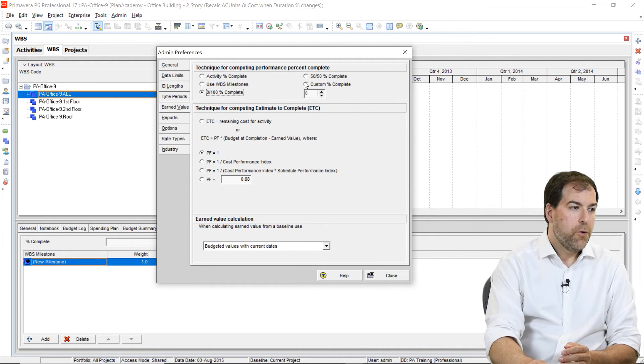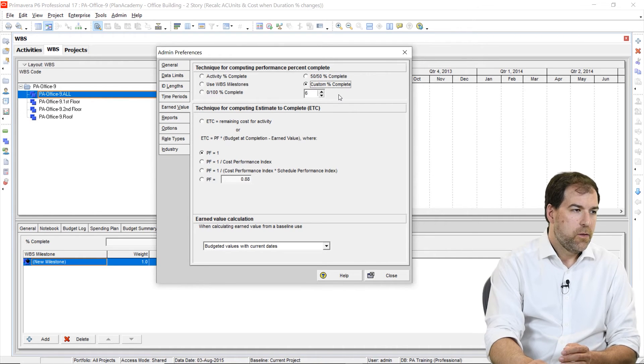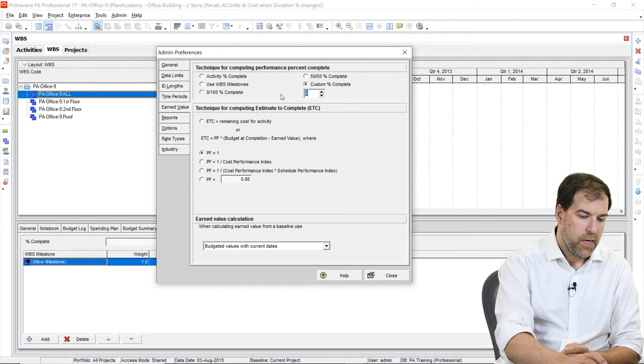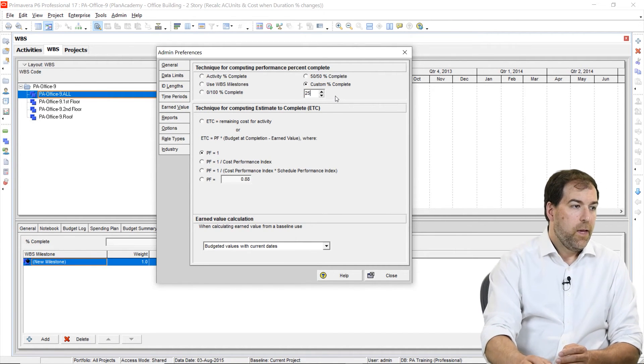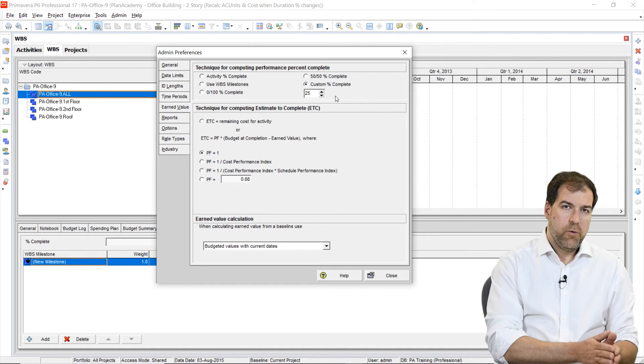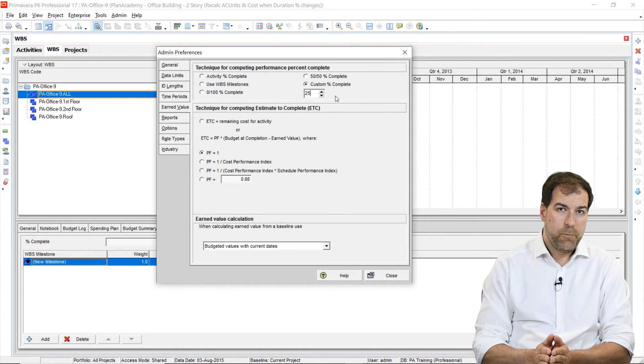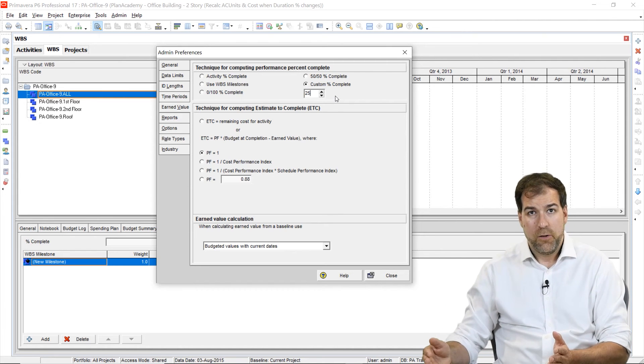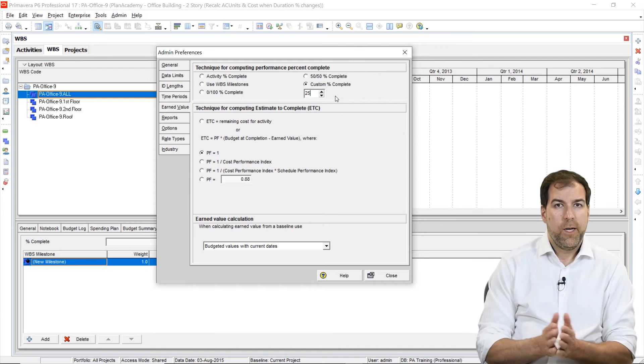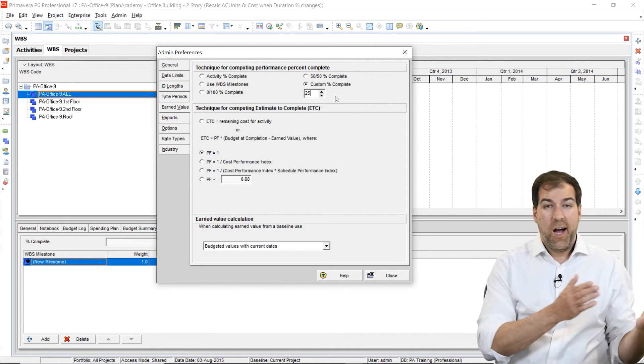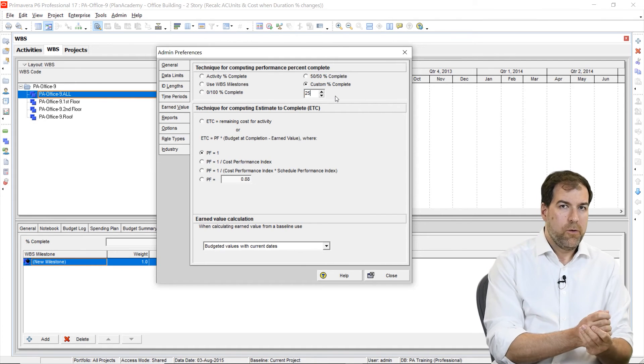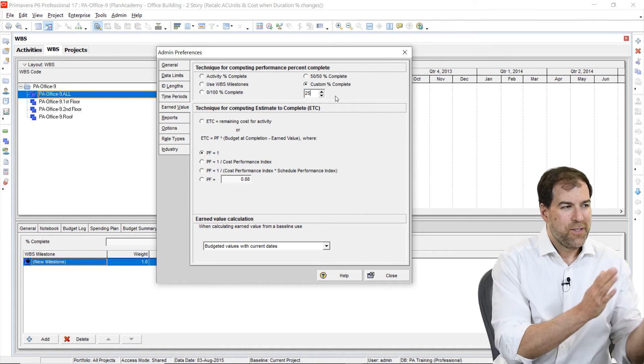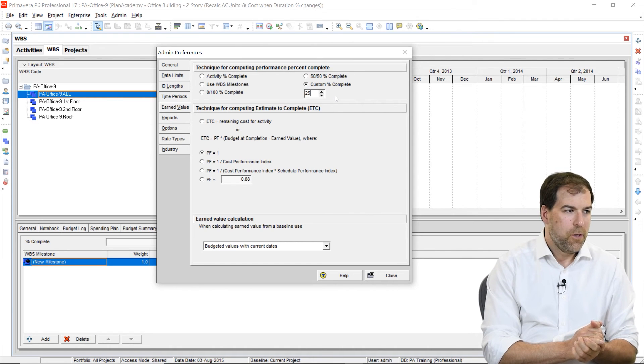Lastly, you can create your own kind of permutation of these ones. So you could say, let's set the custom percent complete to, say, 25. And what that means is the activity will be 0% complete up until it's 25%, and then it'll stay 25% until it's 100%. So you can also create a custom one like that. Again, I don't see many people using this, but if you're feeling adventurous, you can certainly give it a go and see what those are all about.